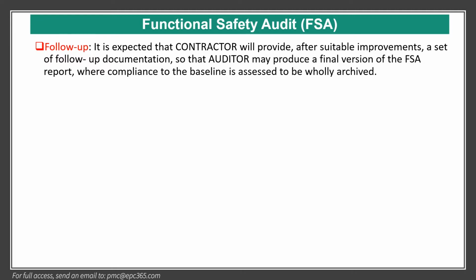Follow-up: it is expected that the contractor will provide, after suitable improvement, a set of follow-up documents, so the auditor may produce a final version of the FSA report where compliance to the baseline is assessed to be wholly achieved.